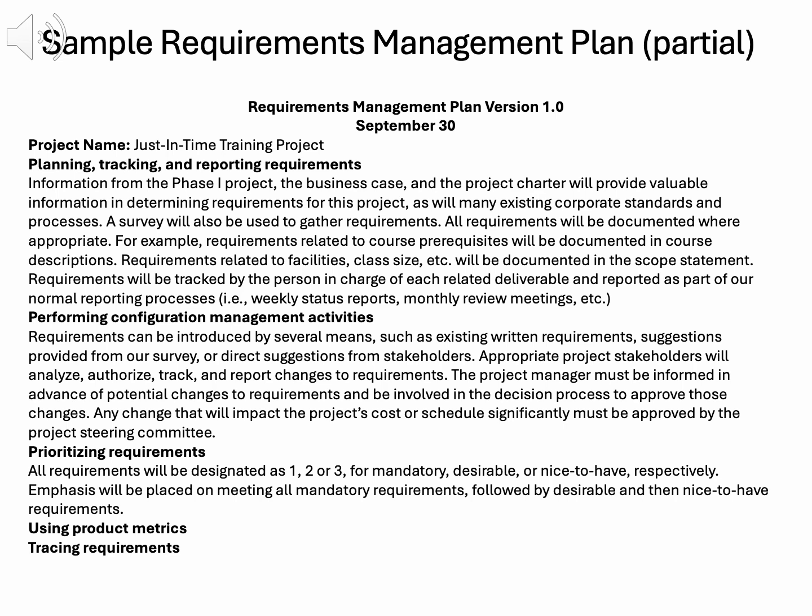Configuration management ensures requirements changes are controlled. New requirements, like additional course topics, are analyzed by stakeholders, authorized by the project manager, and approved by the committee if significant. This prevents scope creep, maintaining focus. For instance, a suggestion to add Six Sigma training would be evaluated before inclusion.